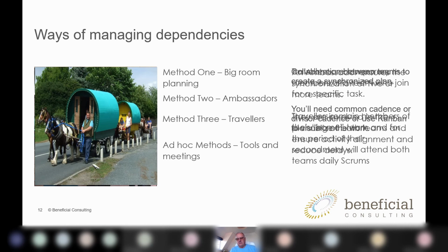And also what you can do is use Kanban to visualize the work and see where the work is flowing, to give you some ideas about how long things are taking and so on. That Kanban process, by the way, if you look at the way in which SAFe does the backlog management with the program board, and the red bits are sticky. Now, obviously, we're not doing that now. So what teams are doing is doing this on a Kanban.